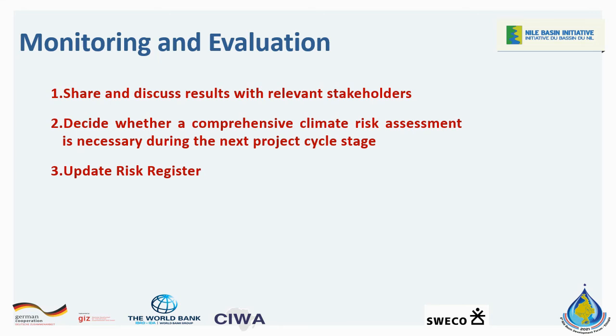And in many cases, for projects that are already running, it might also be necessary to decide whether a comprehensive climate risk assessment is necessary during the next project cycle stage, and that is during the project development, but also during the operation of the project. And even when a project is in operation, it's important to always update this risk register so that we know where we stand and find a way to deal with climate change.